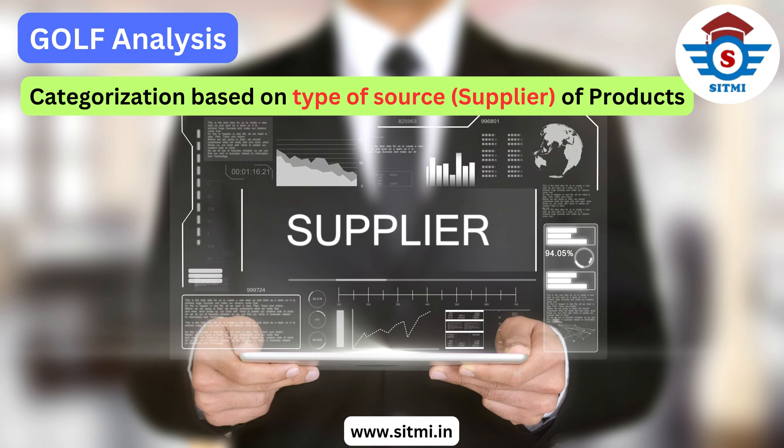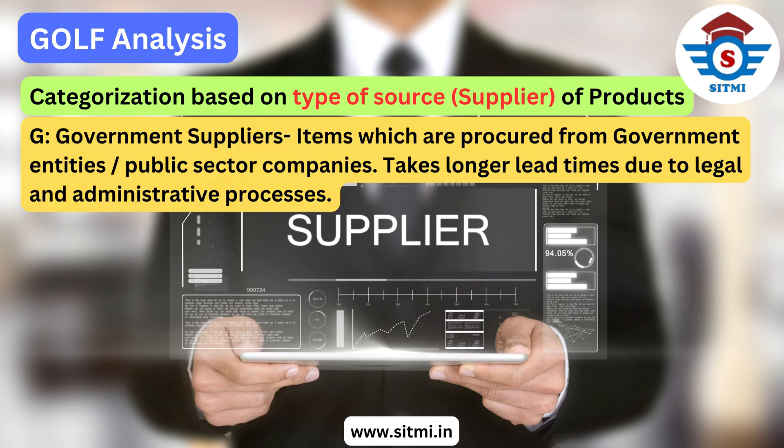The word GOLF defines four major types of suppliers. The first is G, which stands for government suppliers. In this category, items are procured from government entities, undertakings, or public sector companies. This type of purchasing usually takes longer lead times due to the requirement of legal and administrative processes.